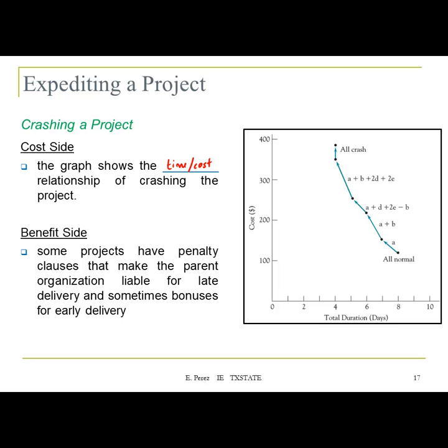And if you look at the slope of that curve, it's very steep, right? So it's not a one-to-one relationship. When you start decreasing the duration, the cost will start increasing at a higher rate.